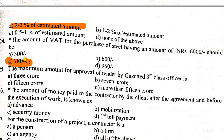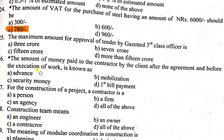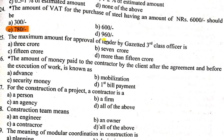Question number 25: The maximum amount of tender approval for a graduated third class officer in Nepal is up to 3 crore. A second class officer can approve up to 7 crore, a first class officer up to 15 crore, and a DG can approve more than 15 crore.